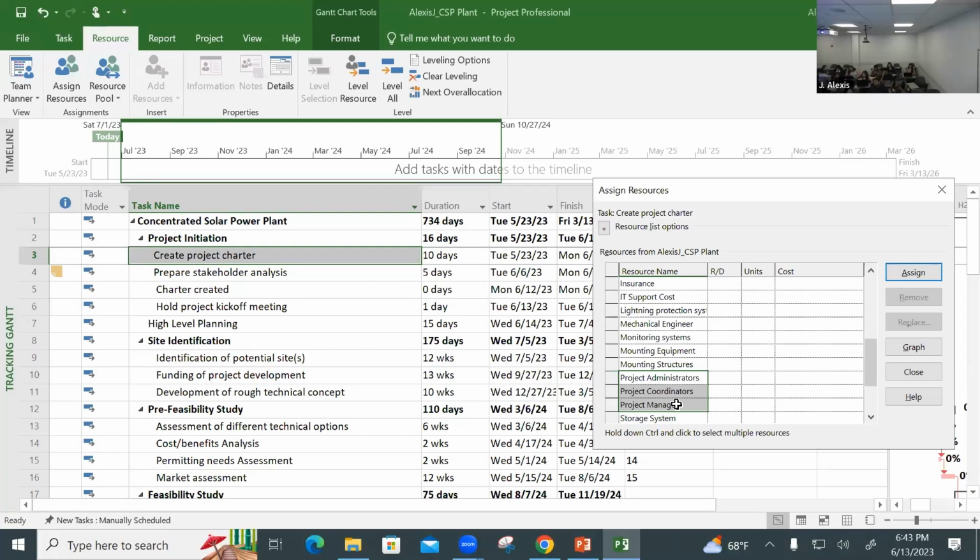So in project management, it means that if I assign one person to complete a task, and I want to go faster and reduce the duration of the project, then I would need to find someone else to help. By assigning another person, the software will ask me what exactly I want to do. Do I want to reduce the duration of this task, or are more work hours required for the same duration? Does that make sense? So the software will want to know what the case might be.